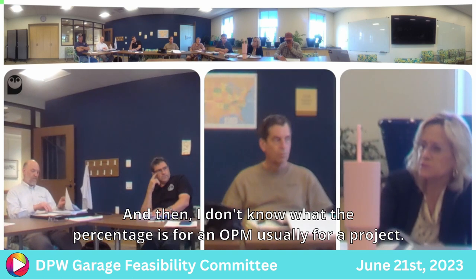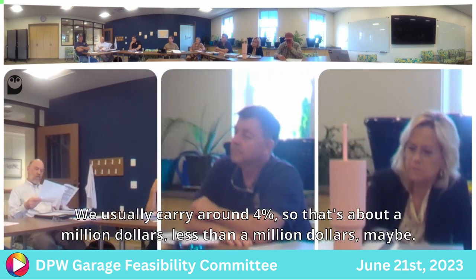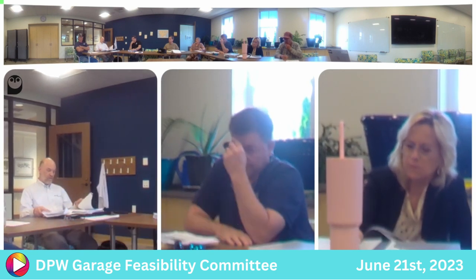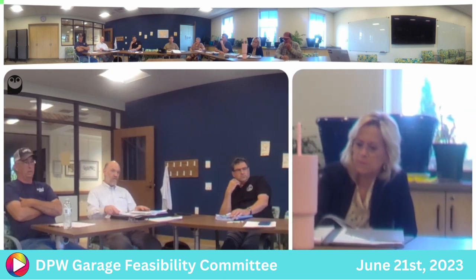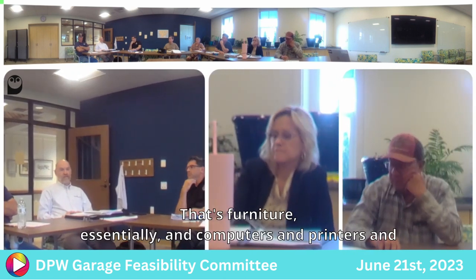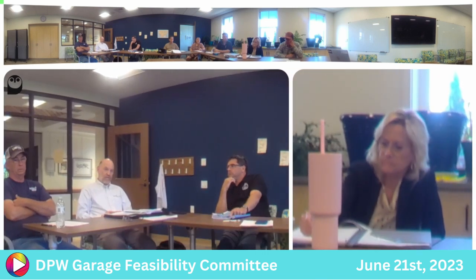I don't know what the percentage is for an OPM usually for a project. We usually carry around 4%, so that's about $1 million, maybe less than $1 million. What's FFE mean? That's furniture, essentially, and computers and printers and things like that that wouldn't normally be under the contract.